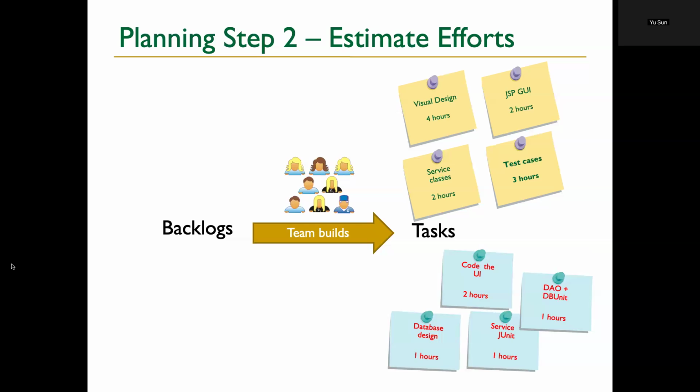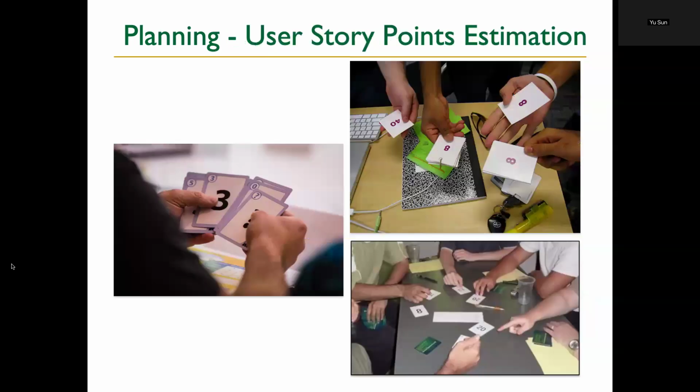We have to balance this one. We have to discuss this one, bring it to the team. Interestingly, in practice, a lot of people do this type of practice, which is very effective. What they want is for people to vote, but to vote at the same time. Because think about it, if I'm the senior guy, I say, well, come on, this is so easy.